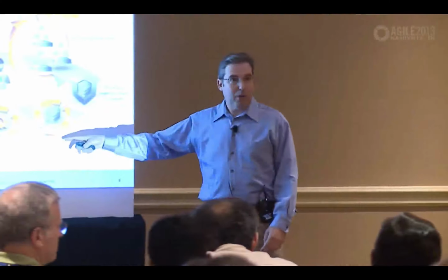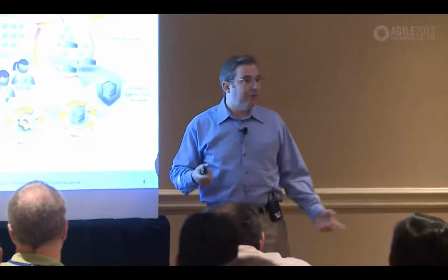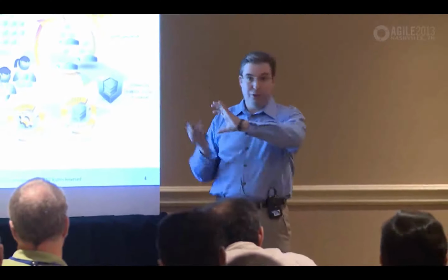And then the last two activities, both inspect and adapt. The first is the inspect and adapt on the product, sprint review, and then the inspect and adapt on the process, sprint retrospective, and then come around and do it again. And of course, after you've done that a sufficient number of times, you likely do have the blue cube, and that would be what you would deploy. Nice and simple. One team, one backlog, everything works really quite smooth. I bet a lot of us have been doing this for a while, probably functioning just fine.